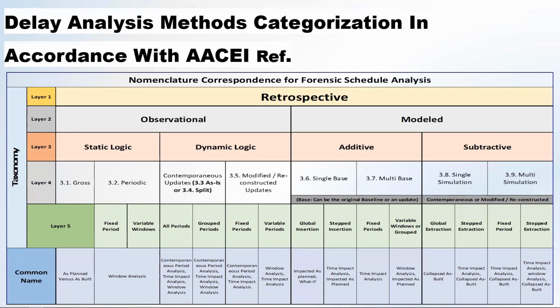And I'm going to do it on the entire project, on the entire baseline, on the entire schedule. I'm not going to segment the schedule or slice the schedule. It's just one schedule, the baseline versus the actual or the as-built, and I will see where the delays come from, and I will go for substantiation and mention that this delay came from